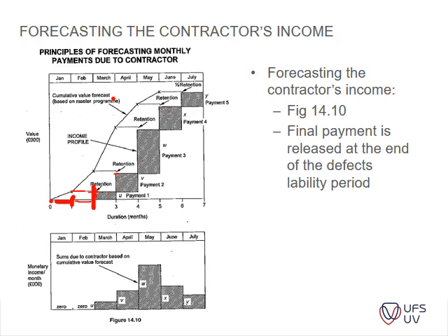Okay, so you remember, the project is now practically complete here. Then you put in your last invoice, the practical completion invoice, and you get your payment there, and then you have to wait until the defects liability period is complete, which is a year or 3 months depending on your contract. So you only get it after a while on this side. Okay, the movement of money.